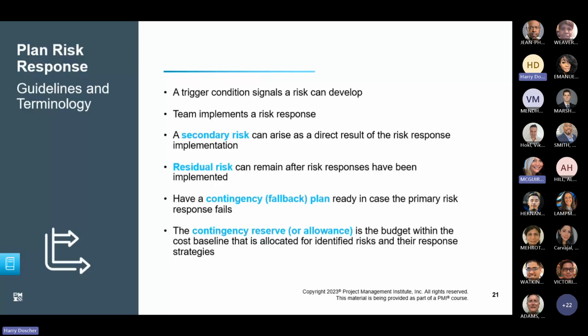So your contingency reserve, remember we talked about budgets last week. Remember, we had the cost baseline. We had a project contingency reserve. We also had a management reserve. The contingency reserve is the budget within the cost baseline that's allocated for identified risks and the response strategies.